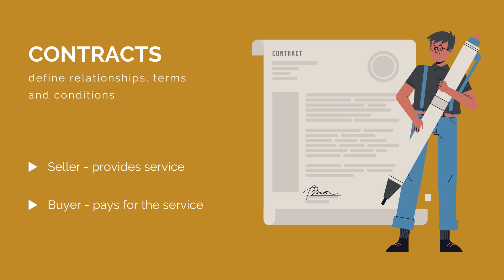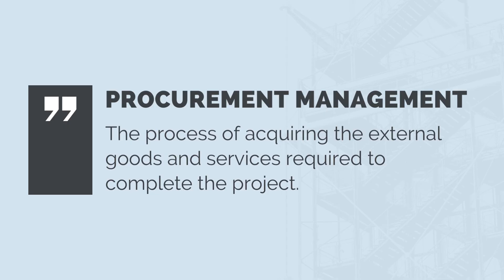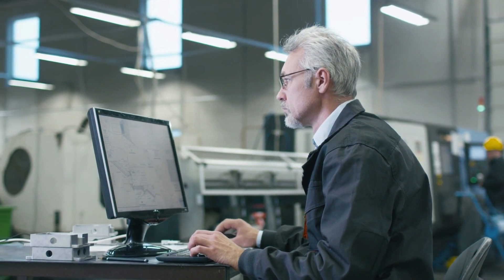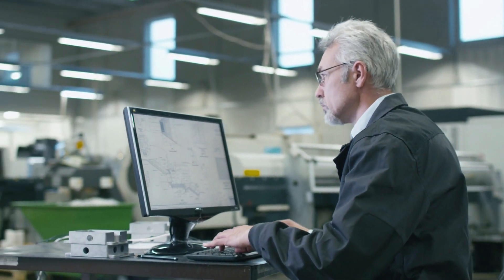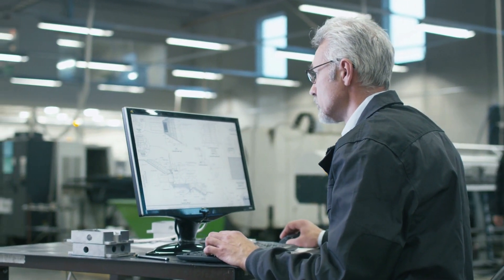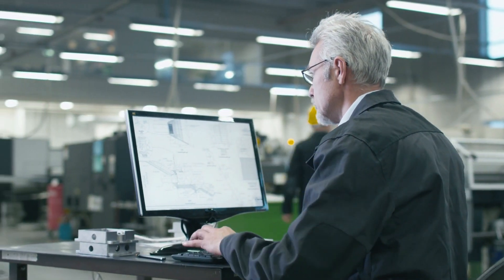Contracts facilitate effective collaboration. Without contracts, it would be impossible to know and keep track of who is meant to be doing what. Now we know why contracts are relevant to engineering — but what does that have to do with procurement? Well, procurement is the process of acquiring the external goods and services required to complete the project from outside the project team. It's the process of forming these contracts, meaning working out what we need to procure and defining exactly what we require the market to provide us. From the perspective of the head contractor, this means finding the subcontractors and suppliers we need to deliver the project — for example, finding a supplier to provide steel reinforcement for concrete works, or finding a subcontractor to install the heating, ventilation and air conditioning in a new building.